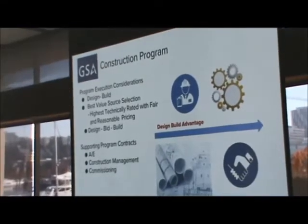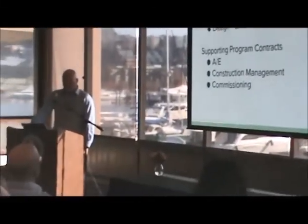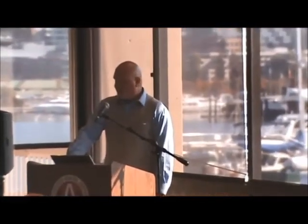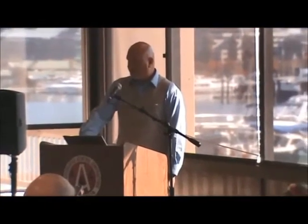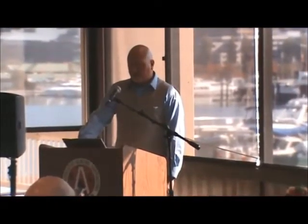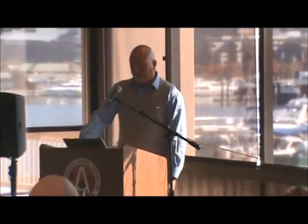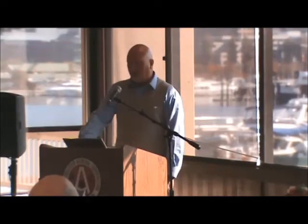We just have found that obviously with low bid, you don't always get the best quality, so we're also looking at a technical rating when we put projects out. Our supporting contracts, we do use architects, engineers, we are beginning to use a lot more construction management services to assist us, and with our buildings, since we are responsible for maintaining operating buildings, we also have a commissioning component to make sure that buildings are operating correctly.